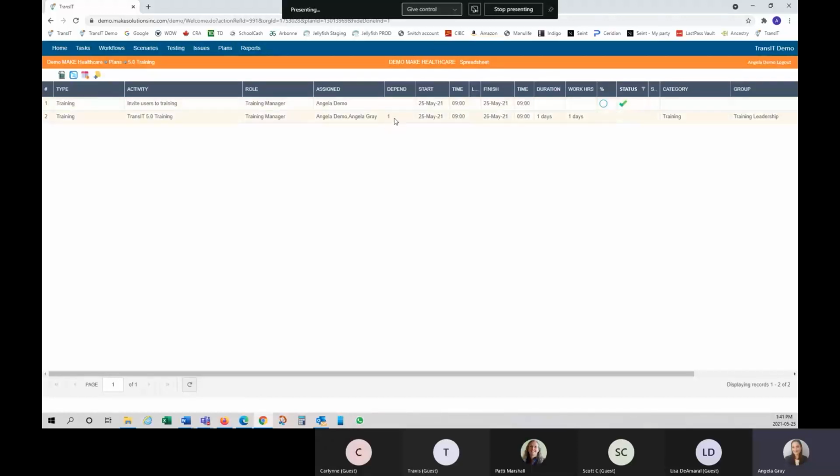So I went into that other plan and I found out that I'm going to say that this second step here is dependent on plan number 3, colon, line number, I think I said 17, and enter here.